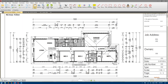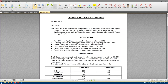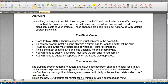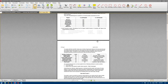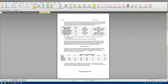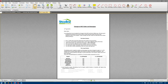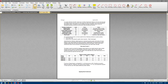And if that is the case, there is risk there. You could require larger diameter downpipes or a greater number of downpipes than what we originally anticipated and drew. And should there then be issues after the fact where it's found that it doesn't comply, you could be found with quite a costly error.